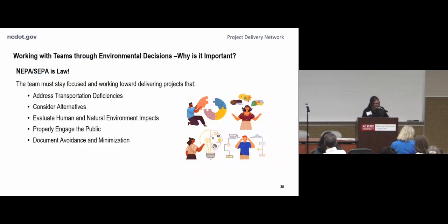Another thing I was going to focus on is advancing NEPA-SEPA documentation. When the PDN was updated recently, I think the word said prepared and we changed it to advance. I know that doesn't make that much of a difference, but it goes to what Derek was saying about people seeing things as a hard stop versus a break and a consideration. The documentation is shown in the middle of PDN Stage 2, but that's not a hard stop. We wanted to make sure people understand that, because you can be advancing NEPA-SEPA documentation throughout.